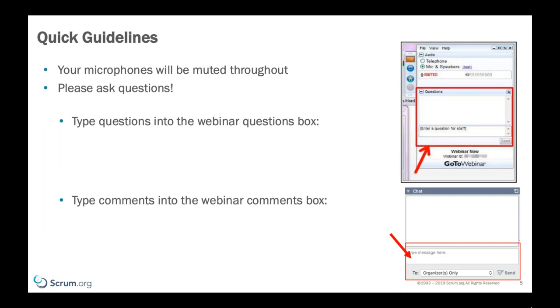They're not giving you $10 million and you take 10 months to produce the reports. They're giving you $500,000, and after the first 2 weeks, you have a report to show them that shows the data that they can validate and check and give you feedback on, and it's provided them with some value. So not only does the customer get value, you've reduced the risk to the business.